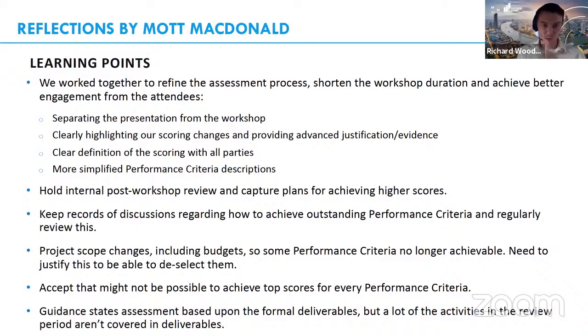Something else that we like to do is, after the workshop, have an internal debrief to both review the comments and the scores, and then to capture our plans for achieving higher scores in the future. It's very important to do that maybe within a week or so of the workshop. If you wait until 2 or 3, 4 months before the next workshop, it's obviously that much harder to remember, and also you don't get the time. You want to implement the changes now, well in advance of the next workshop, to gain those additional improvements.